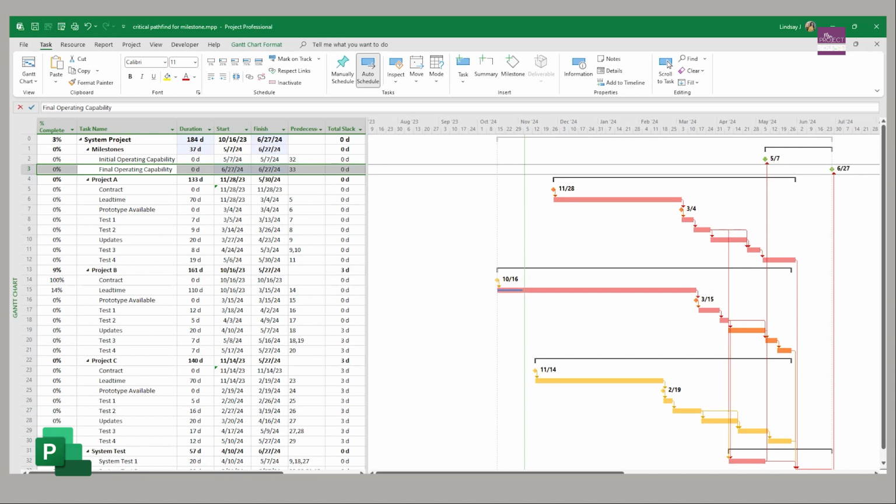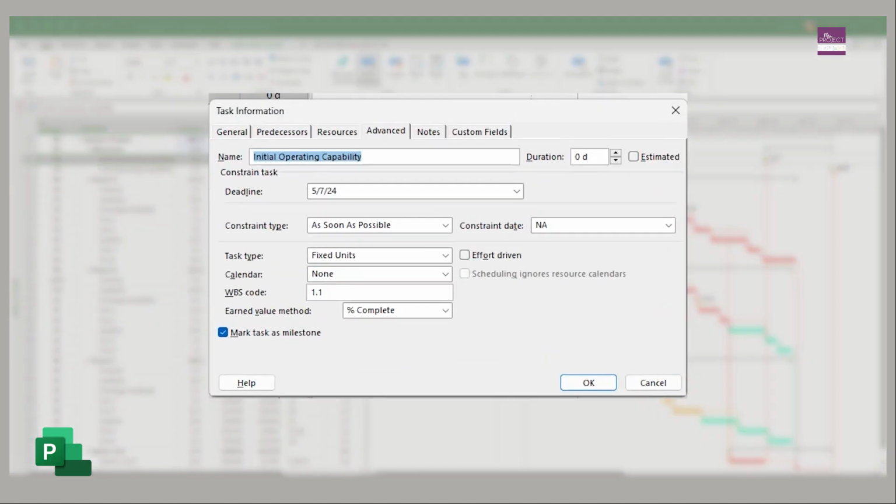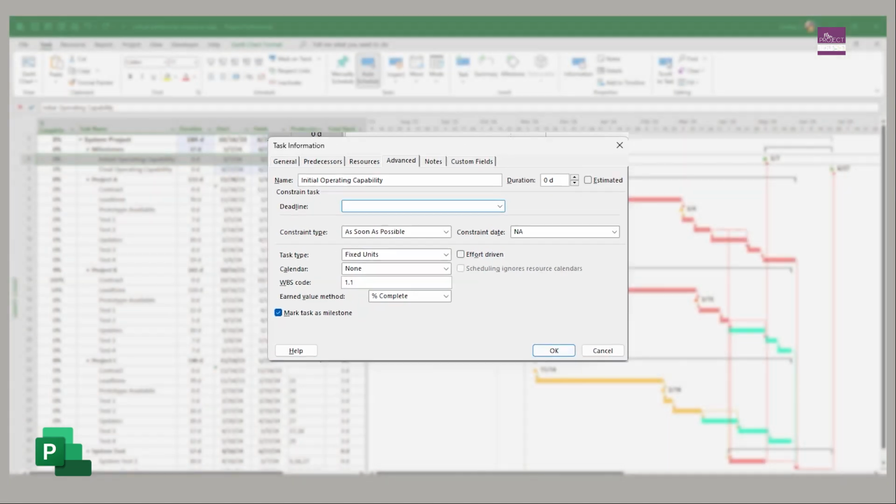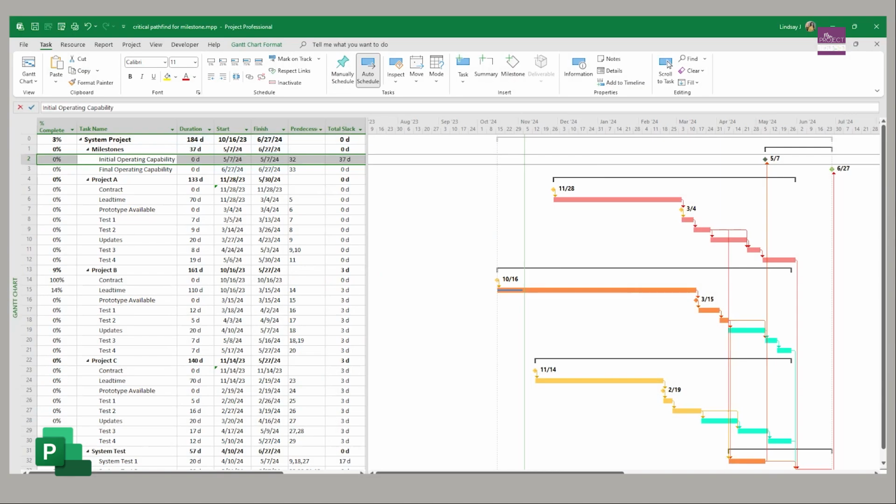If you want to, you can remove the deadlines that you also set. That's up to you how you want it to be. It's just a simple deletion, and there you go. But just remember to, once you run those what-if drills and finding the critical path for an interim milestone, make sure you change back that slack that you put in.